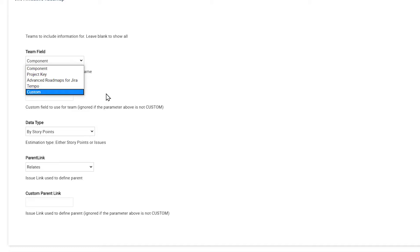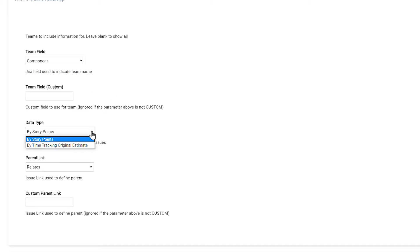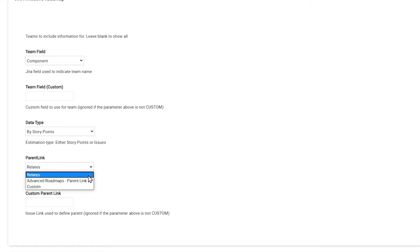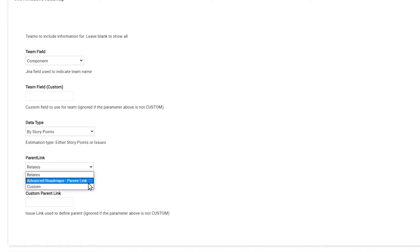For Data Type, choose whether you want to track by story points or time. Choosing Parent Link will target the parent link created by Advanced Roadmaps, formerly known as Portfolio. Choosing Relates uses the Relates To link type, or you can choose the Custom option and enter the Custom Parent link.